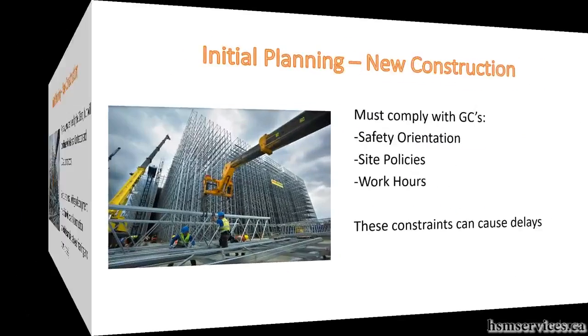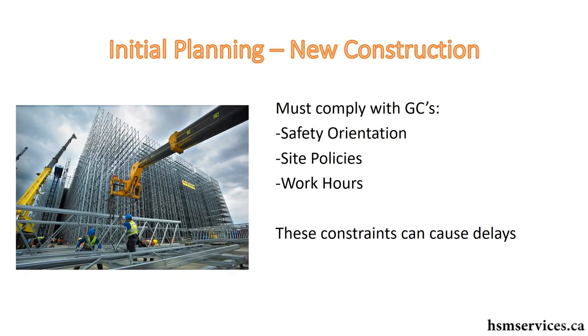The other thing that you have to think about is on a construction site with a larger construction company, there are all kinds of policies. You have to wear a hard hat, you have to wear steel-toe boots, you might have to do a safety orientation, which could take you an hour or it could take 2 hours. You have to figure out what your work hours are going to be.